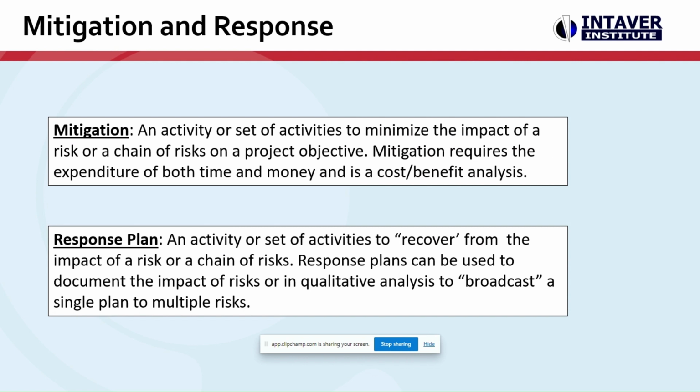Just to give some definitions of how we define mitigation and response. Mitigation is an activity or set of activities to minimize the impact of a risk or chain of risks on a project objective. Mitigation requires the expenditure of both time and money and is a cost benefit analysis.